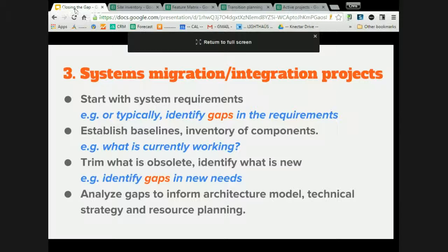Now this is obviously less agile. This is a little bit more of a waterfall thing, but it's almost unavoidable because when you're asking questions of this legacy system, you need to hold the value of that thing against some truth of: this is what we need to do. This is what we need to accomplish. This data needs to exist somewhere. And this is why, because there's a transaction involved. Well, that's a business requirement. That's not like we use the Drupal X module. No, we need to know what that thing is, because that may not live in Drupal even, right?